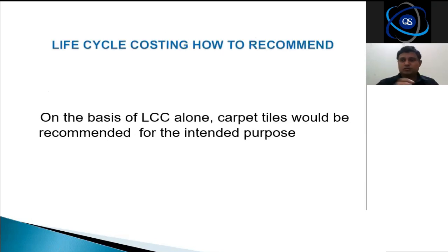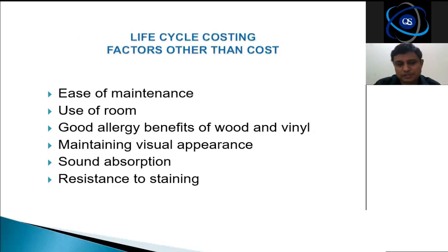Now your exercise is over. Then you have to specifically mention, there should be an express statement which states, on the basis of life cycle costing alone, carpet tiles would be recommended for the intended purpose. But as I have told you in the previous slide, there may be other systems. So when you're making the report, you have to talk about that.